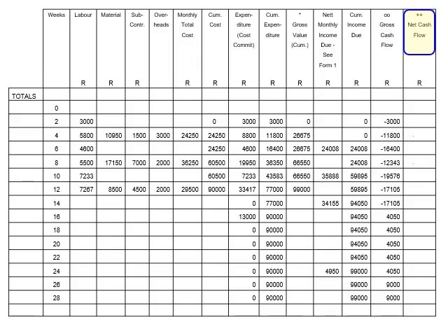Net cash flow is the money available, at a certain point in time, after receiving a progress payment, or revenue. We shall therefore use the amounts in two columns to determine the net cash flow. These are the cumulative expenditure column, and cumulative income due column. To perform this calculation for a specific period, we shall use the amount in the current period, under the cumulative income due column, and deduct the amount in the current period, under the cumulative expenditure column. This is a straight calculation. Let us perform the calculation, and it will explain itself.